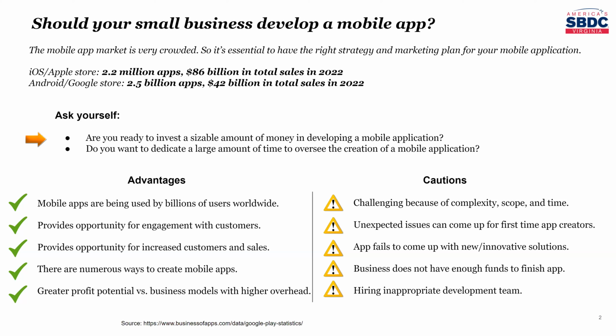And this is very common, usually with first-time app developers or creators, because they just haven't gone through the thought process before. But if you add 10 things instead of 3 into your app, it's going to take a lot more time and money. So that's a real big issue that can sometimes sink a project before it can even get completed.